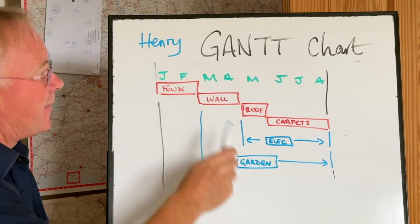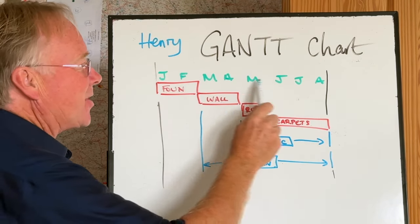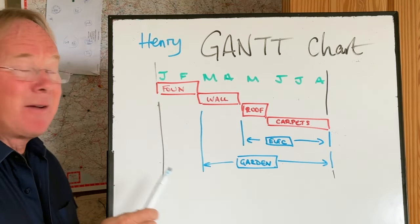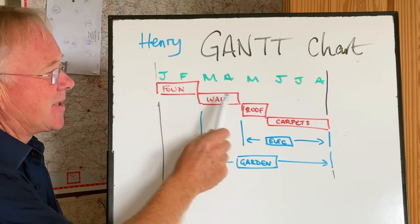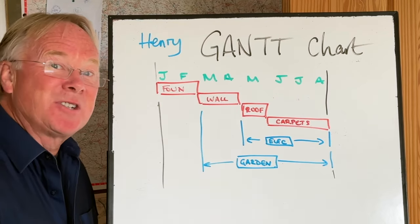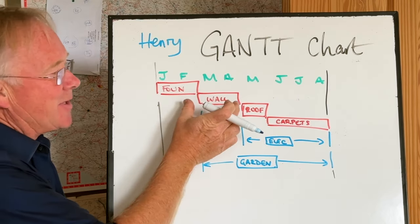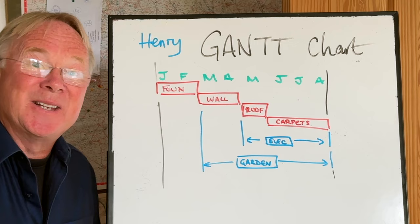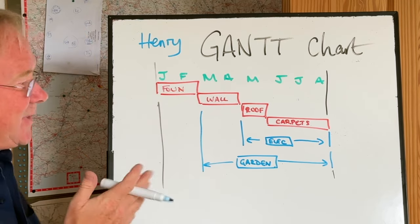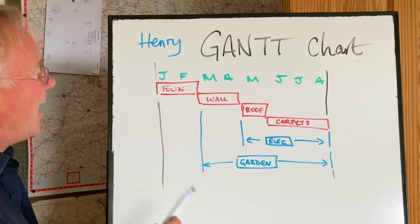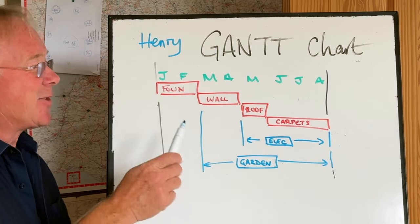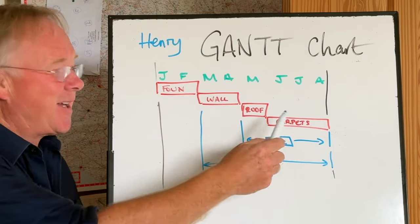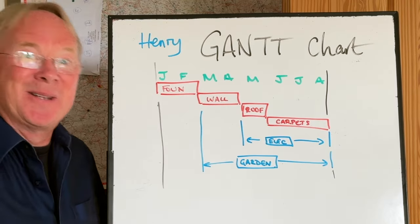You have the timescale across the top — I've got months here, but it could be weeks — and then you have your main tasks. This is known as the critical path, and these are the ones that define how long your project is going to take. In my simplified example here, I've got building a house: the foundations, the walls, the roof, and then the carpets.